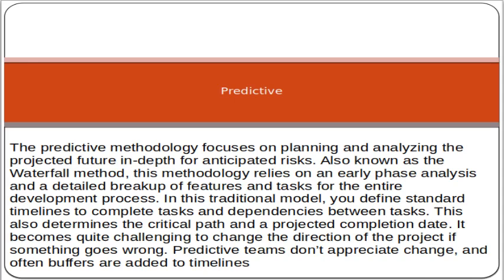The predictive approach — also known as the waterfall or traditional project management approach — focuses on completing all planning and analysis in the initiation and planning phases. All development is done first, then testing, then deployment. It is a sequential approach in which planning, development, testing, and deployment are performed in order.